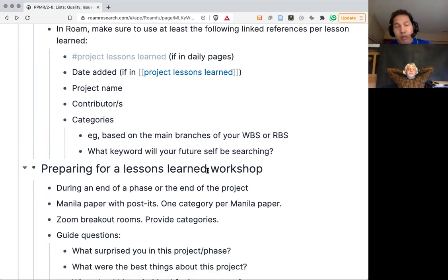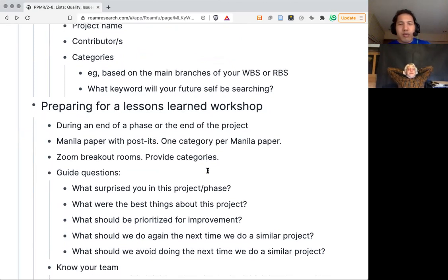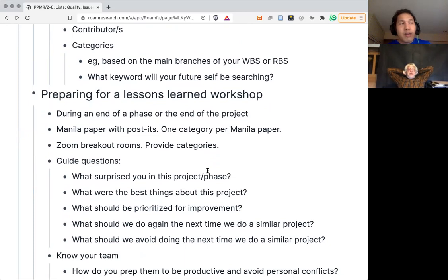Some guide questions I normally use are, what surprised you in this project? This is my favorite question when it comes to this, and even when interviewing other project managers when they start a new project. So it's like, what surprised you? Because if it surprised you, it will probably surprise me. It's something we don't expect.